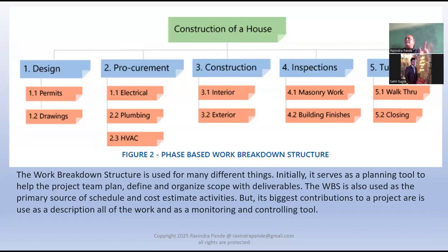This is just the understanding of detailing of tasks. So what needs to be done? Well, you have to have a design, you have to have some procurement procedures, you have to have some construction processes, and so on. So these are the work structure to be done. That's why it's a work breakdown structure, not a project plan. We are not mentioning dates or resources or any plan here, right? That's right. It's just a work breakdown.